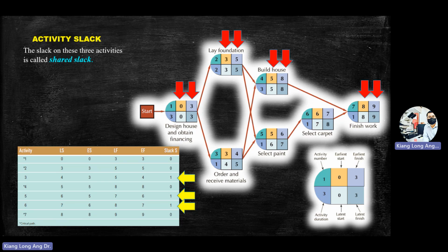Then yesterday we also found that for these activities 3, 5, and 6, each one of them has slack time of 1 month, 1 month, 1 month, but the total slack time you have is not 3 months. You only have 2 months, because if you spend one month in one of the activities, you will be out of the project. It means you will spend more time than you should. So this is a brief summary of what happened in the previous lecture.